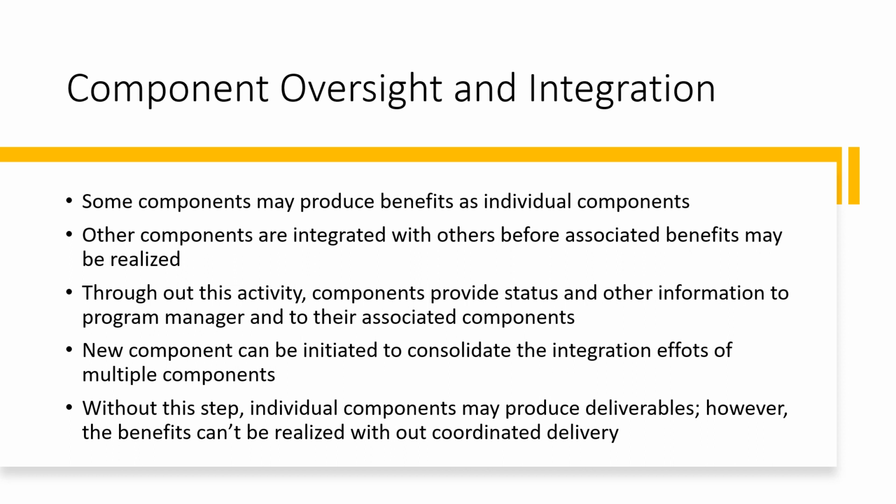Throughout this component oversight and integration, the components always provide status and other information to the program manager and to their associated components. A new component can also be initiated to consolidate the integration efforts of multiple components. Even without this step, the individual components may produce deliverables, but the benefits cannot be realized without coordinated delivery. That is the importance of component oversight and integration.